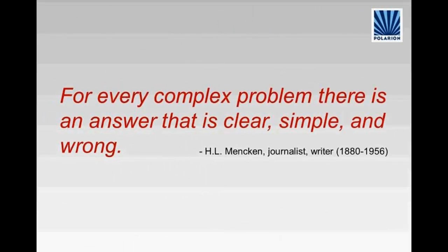So far, it's pretty simple. I mean, all I need is to gather items together in a backlog. I can have multiple backlogs. I estimate the cost from the top to the bottom. I think about the benefits. Again, in a support backlog, the benefit is explained more or less by the support level. So the customers with gold support have the biggest priority, biggest benefit. For a features backlog, the benefit depends on other criteria.